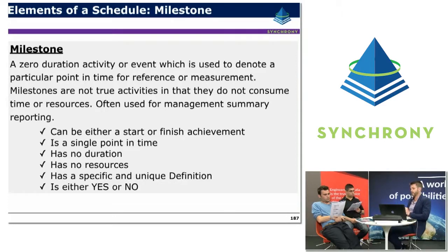It can either be a start or a finish milestone. It's a single point in time, doesn't have duration or resources normally, and is typically either yes or no, either it has been done or it hasn't. It typically doesn't have a percentage assigned to it.